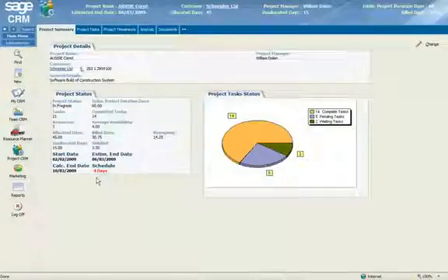But the idea is you have a schedule, and you can see here that we're slightly behind on the schedule because based on the average availability and the amount of days that have gone by based on today, we are behind by 4 days, and you'll see that change as we add tasks and timesheets to it. So this is a management overview of what a project can look like. On the right hand side, it also includes a breakdown of the stages that any projects are in. Complete, pending and waiting, again customizable.